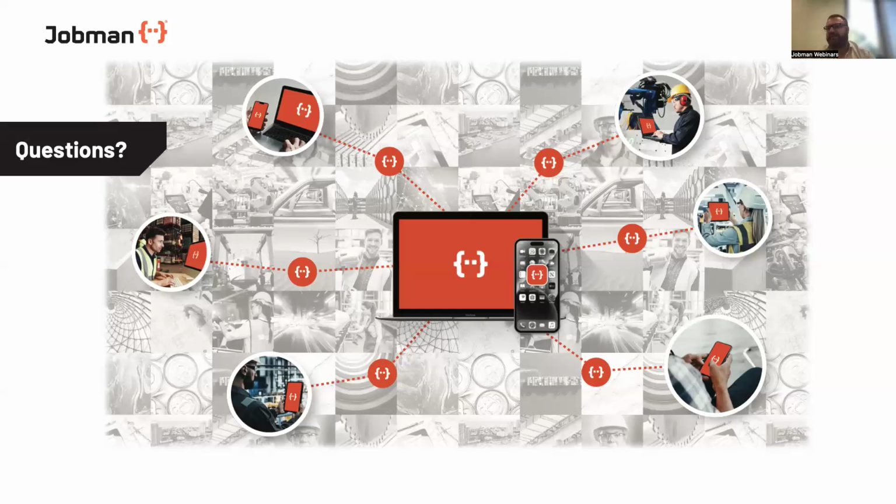So the main use case for the import export for the CAD programs is actually the job resource materials. So again, Microvellum can produce a report that brings out, I believe it's SKU or product name, description, code, quantity, and then same process again. So if you've built, for example, your hinges in Microvellum and use Blum, you have that SKU in Microvellum and you make that drawing. When we export the raw materials report with the optimized hardware lists, any of those SKUs that match in Microvellum and Jobman can be brought in.